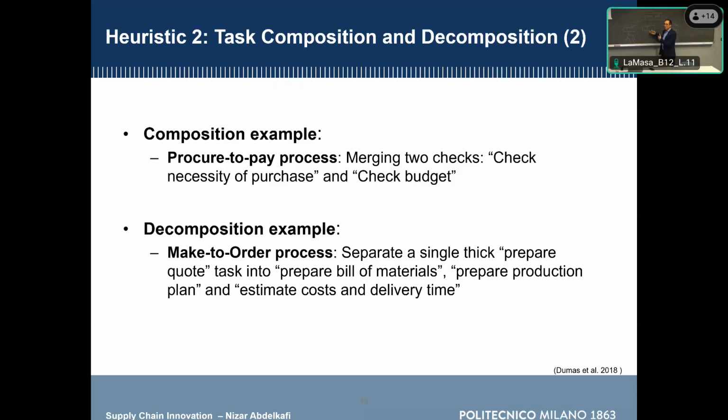And once we know which machines, perhaps which equipment, which stations, etc., will be used, so here equipment, machines, people, resources in general, that will work on it, we can estimate the cost. Yeah, we can estimate the cost and we can estimate the time, because we know which machines, etc. We know about our costs. So this is a task of decomposition, which is about preparing a quote.